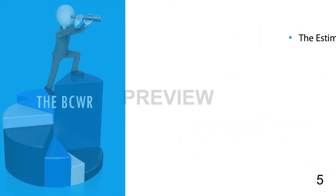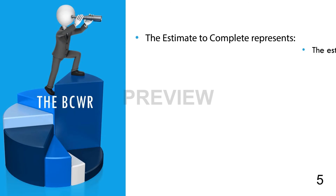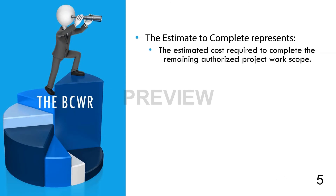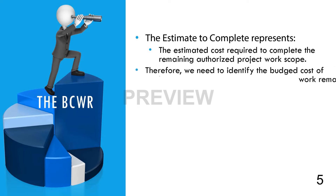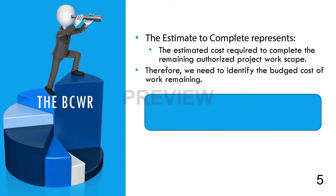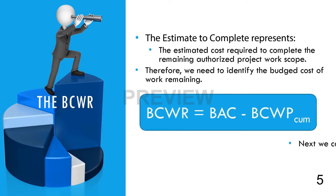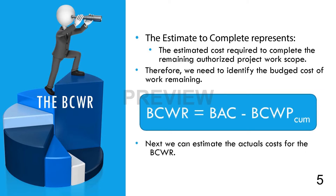The essential formula for all EACs is the cumulative actual costs on a project plus the estimate to complete the remaining work. The actual costs of work performed is simply an export from the Earned Value tool, so the more difficult part of developing an EAC is creating the Estimate to Complete, which is the cost required to complete the remaining authorized project work scope. In an EVMS, the budgeted cost of the work remaining, or BCWR, is calculated as the budget at completion less the cumulative earned value, or BCWP. This formula provides the budgeted value of that remaining work.